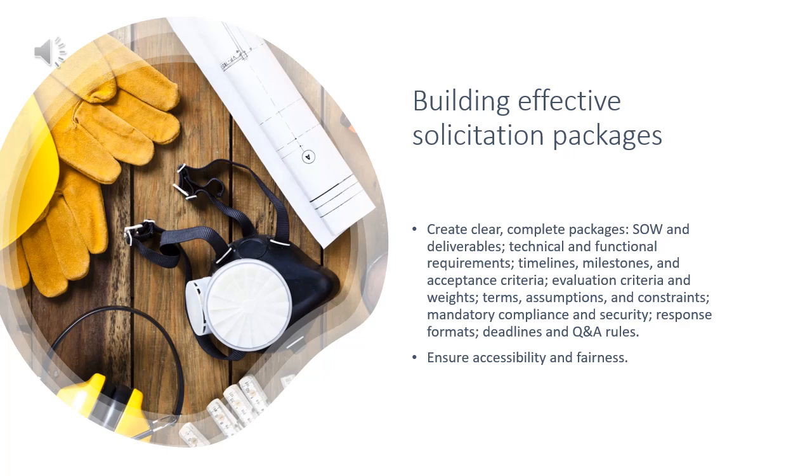Include a clear statement of work and deliverables. Provide technical and functional requirements. Add timelines, milestones, and acceptance criteria. Define evaluation criteria and scoring weights. Include terms, assumptions, and constraints. State mandatory compliance and security requirements. Provide formats for responses. Specify submission deadlines and Q&A rules. Ensure accessibility and fairness for all vendors.